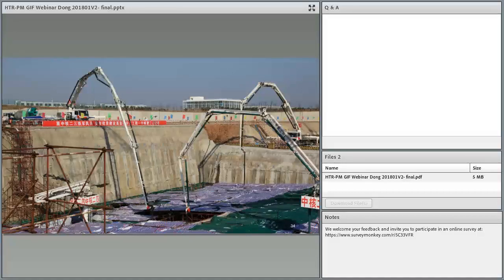After the construction permit license was issued by the NNSA of China and all government approval procedures were complete, the first concrete of the HTR-PM demonstration power plant was poured. This picture shows the occasion of FCD. As you see, the foundation was covered by snow. It was very cold that day, but we were really excited because we could finally start construction of HTR-PM.